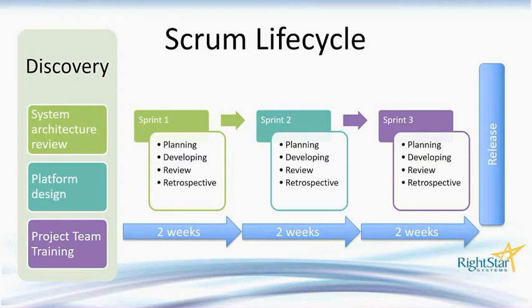And one of the functions of the Scrum Master is then, on a regular interval, typically 2 weeks, to plan with the team. So you have a Scrum Master, a business owner, and then the implementation team members. You determine which of those requirements from the top of the list, priority-wise, are going to be developed within this 2-week period.